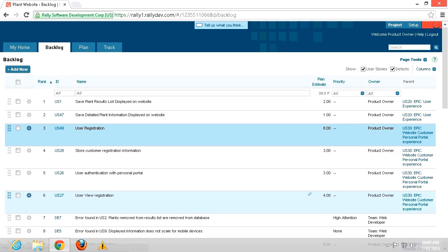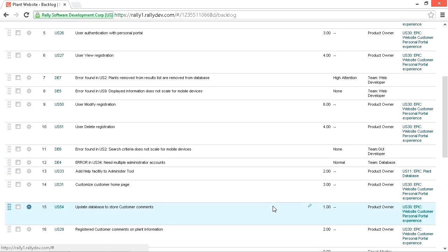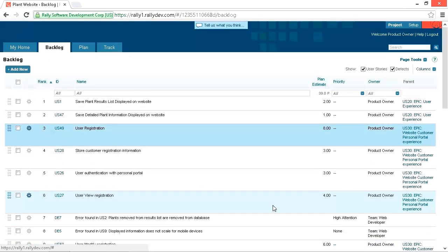According to the INVEST guidelines, a high-quality user story can be understood, implemented, tested, and demonstrated on its own. It can also be independently valued by itself in the product backlog. This allows it to move up and down in the product backlog as its priority changes, without affecting any other user stories. We want the priority to drive when the user story is implemented. So if its priority goes lower, it goes lower in the backlog. And as its priority goes up, it can be moved up in the backlog so it is implemented sooner.